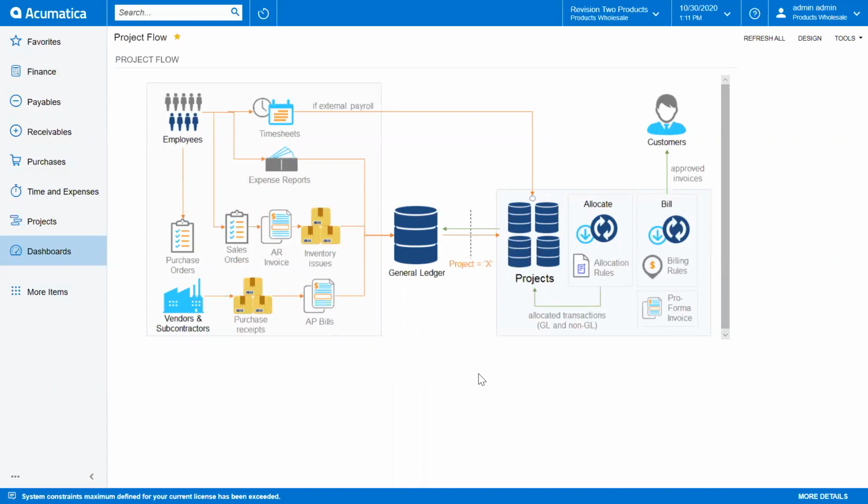For example, I can create a pro forma invoice for a project. It gives me as project manager an opportunity to review all of those transactions before I actually book them against the general ledger against receivables. In this case, this will be helpful if I have a new consultant and they billed 8 hours, but maybe there was 3 or 4 hours of on-the-job training, so therefore I can't really bill the client for the entire 8 hours.